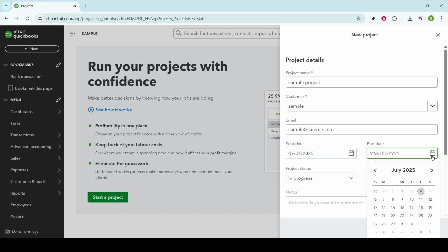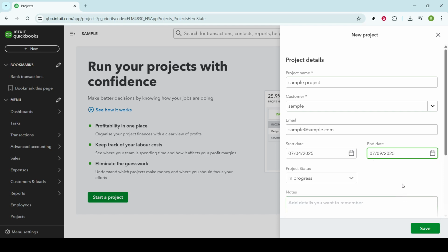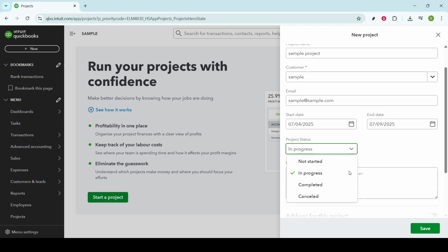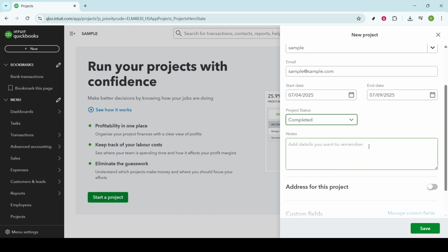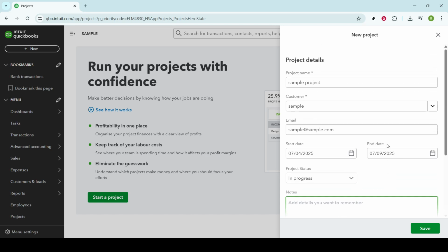To delve deeper into planning, consider adding tasks directly associated with this project. By clicking to add a task, you'll be prompted to give it a name, which should align with your overall project goals. This helps you focus on individual aspects efficiently. Just like you did for the whole project, assign each task its own due date. Setting these task deadlines ensures each step is completed on schedule, which in turn facilitates a smooth progression from one phase to the next.